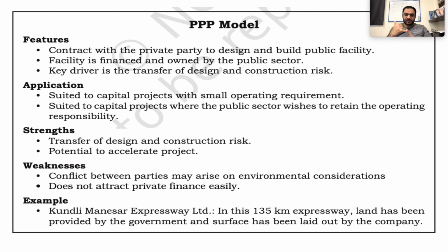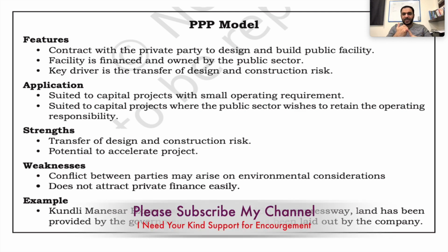First of all, the first feature is this. Secondly, the facility is financed and owned by the public sector. Third, the key driver is the transfer of design and construction risk. These are the main three features of the PPP model. Application: how you will apply that.